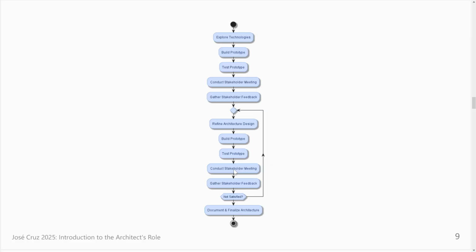Maybe someone should decide, okay, don't develop this project, just decide something. I have a video about this, it's a decision framework called time box. Just create a time box and say, okay, in 1 month we should have a decision. Maybe we can analyze every week and we will promise each other that after 1 month we have a final decision and it should be a go or a no go.